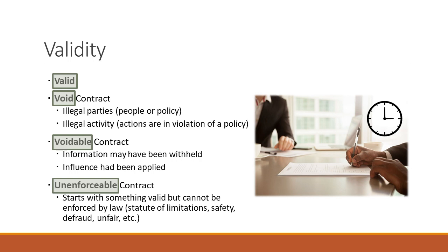There's one example here that says statute of limitations and laches, a delay issue. We'll talk about that in a later class. But I'll give you this as an example so you understand how a valid legal contract, where everybody was on the same page, they all had a meeting of the minds, could not be enforced due to what's called a statute of limitations. So in construction, we'll take Illinois as an example. If you want to bring a breach of contract action, you need to bring it within 4 years of when you knew or should have known of the problem that caused the breach, or if it's a written contract, no longer than 10 years.